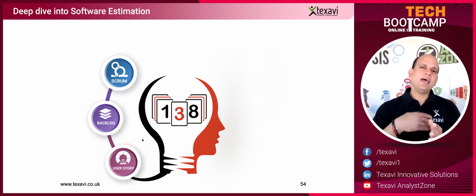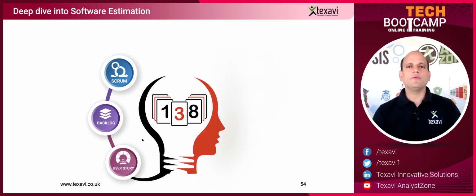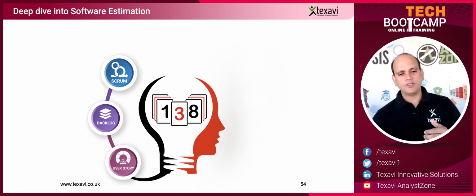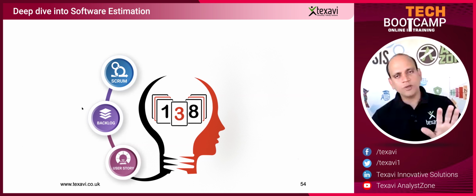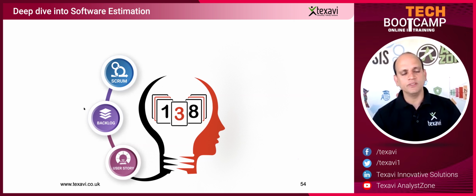And then you can add your own technical task, as what we call. And then you can have front end, you've got back end, you've got middleware, the APIs, you have different elements, different aspects that you can try and compare and contrast with, and then think in terms of how you can achieve that functionality that you mentioned here in the user story. How can you achieve this in terms of the backend, in terms of the data, in terms of the middleware, the APIs, the application logic, and the front end, how it should look and how it should feel, the visuals. So all of these, you can create tasks for it.